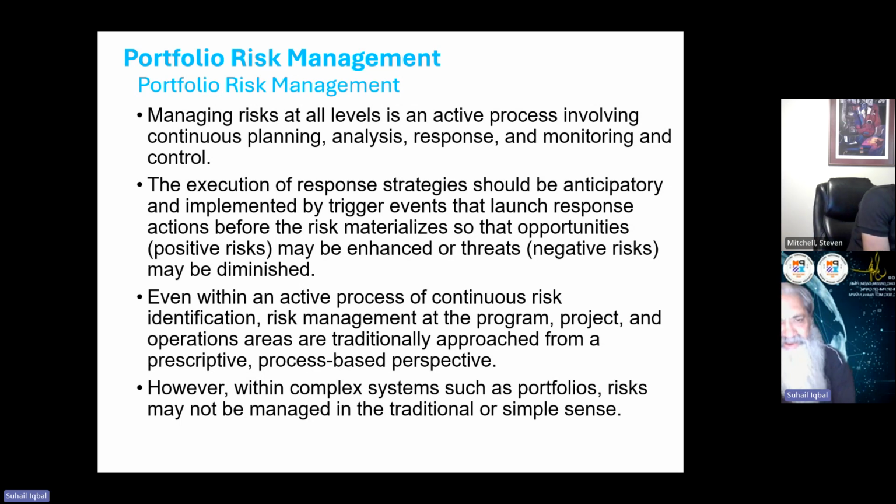So these things are applicable here as well, but not in that exact manner. The execution of response strategies should be anticipatory and implemented by trigger events that launch response action before the risk materializes so that opportunities, positive risks may be enhanced or threats may be diminished.